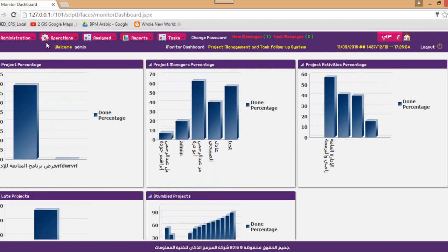So now, as you see, the project management office is going to create the project. Then the project manager is going to assign projects in order to create his tasks. Then the employee or contractor who's assigned the task is going to see his tasks in the assigned tasks. And the executive is going to see the overall percentage from one very easy screen showing him only percentages of completion. So this is how we link the 5 parties involved in the project.